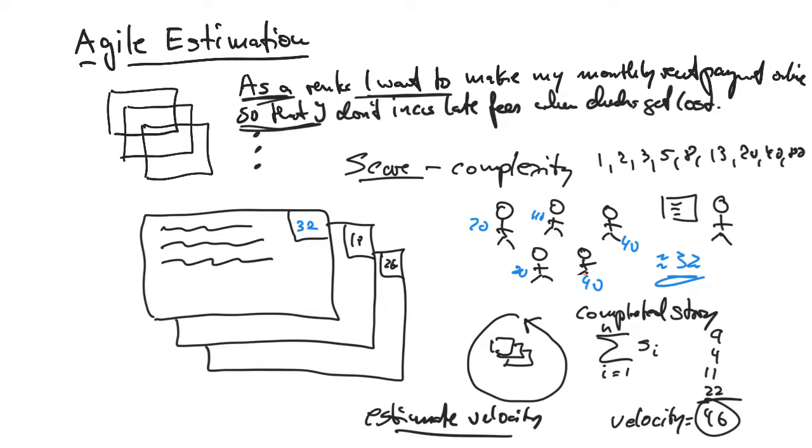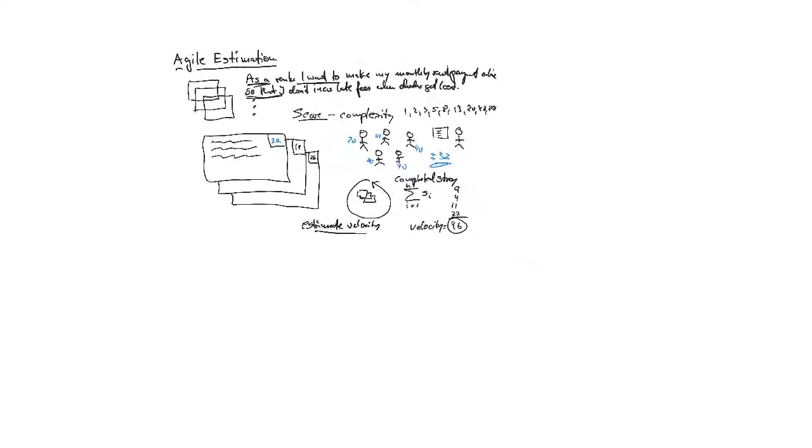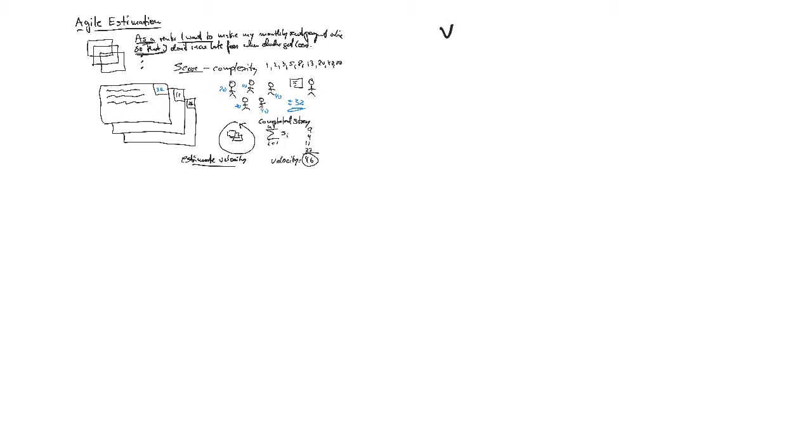So one of the things that's important about Scrum is you don't provide an estimate until you have a measurement of your velocity. Meaning all of your estimation is empirical. It's based on observation. But then how can you use this? And here's how you can use this. What if I know my velocity? Let's call it V. I still have my backlog of stories that I have not yet implemented.